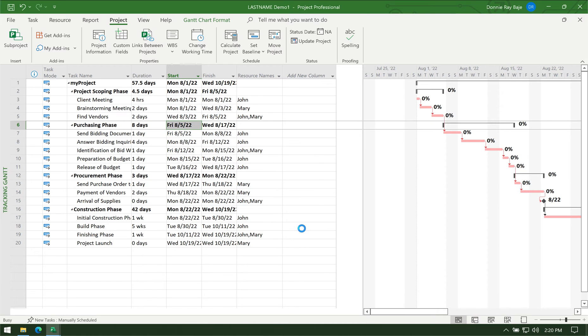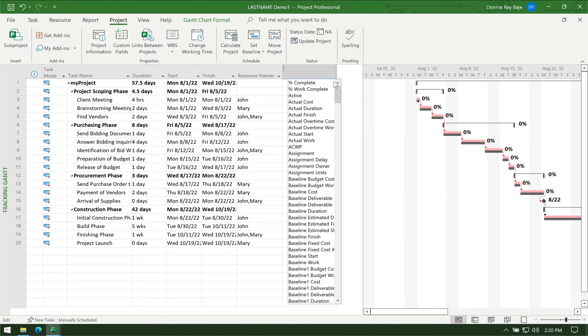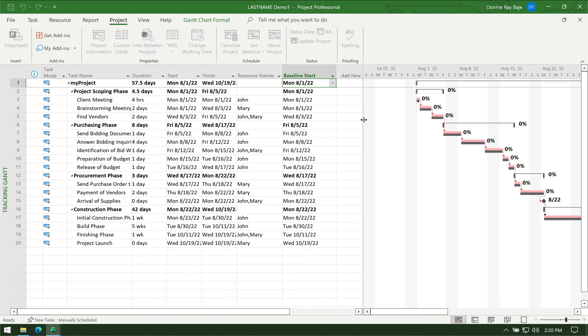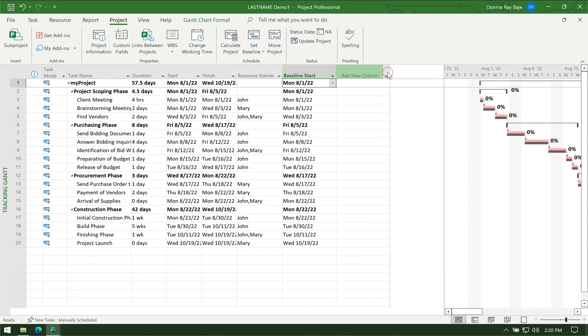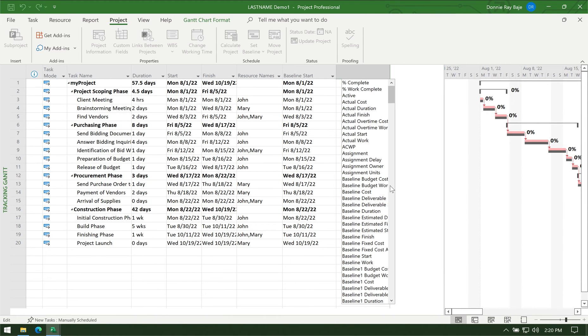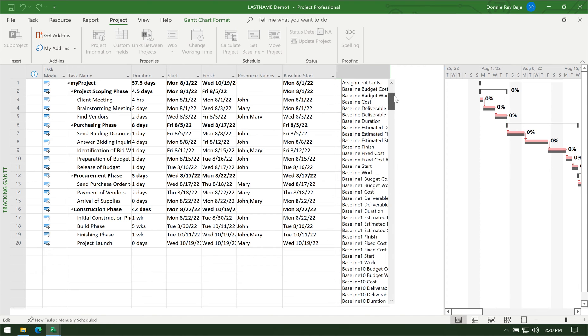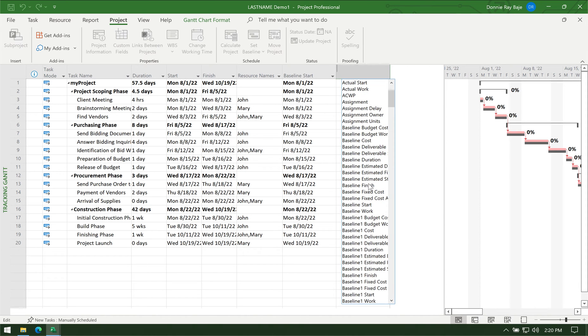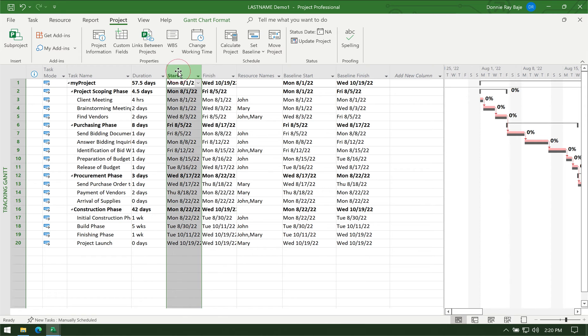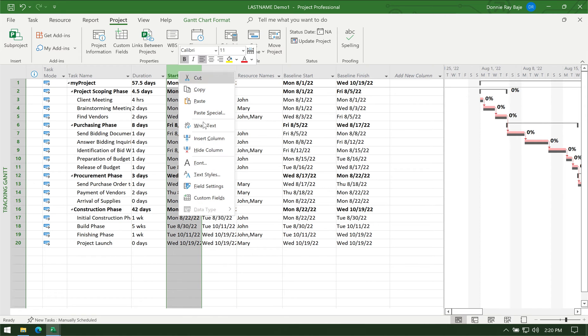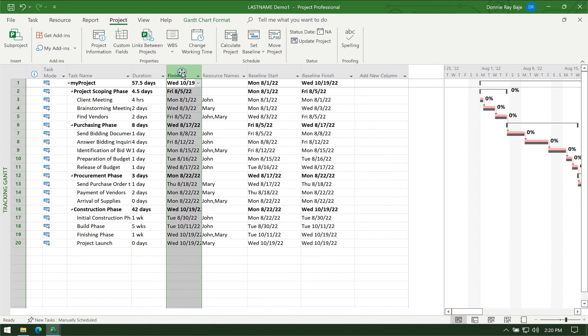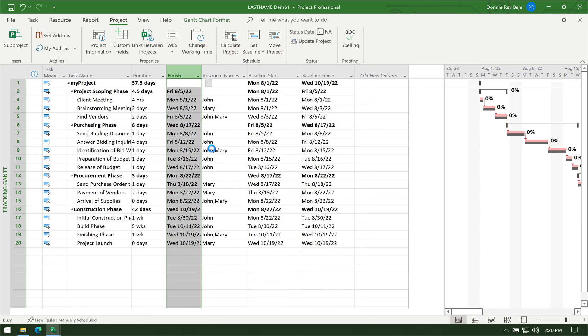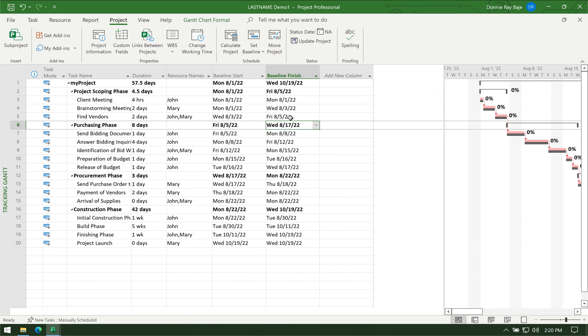From there I can now see that when I add new columns, the baseline start and the baseline finish will pick up the data that I've entered in my start and finish columns, which I do not need anymore. I can hide them now.